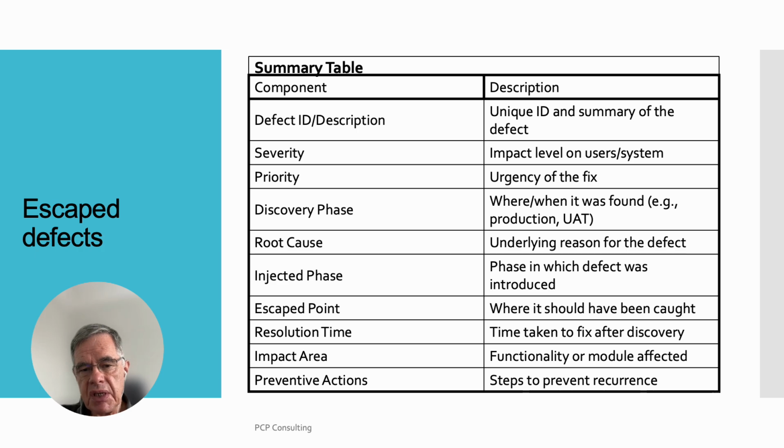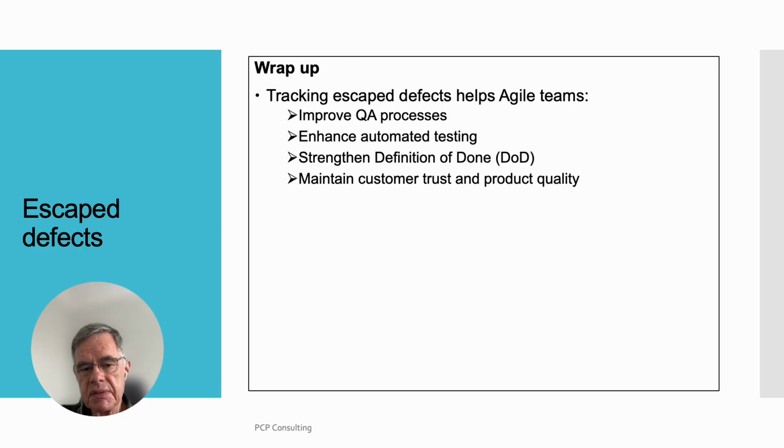Root cause, underlying reason for the defect. Injected phase, phase in which defect was introduced. Escape point, where it should have been caught. Resolution time, time taken to fix after discovery. Impact area, functionality or module affected. Preventative actions, steps to prevent recurrence.